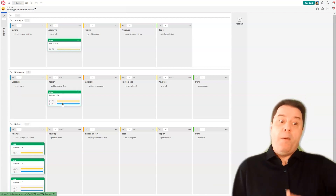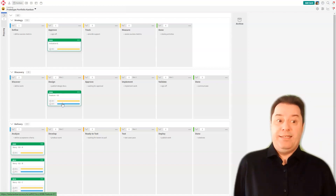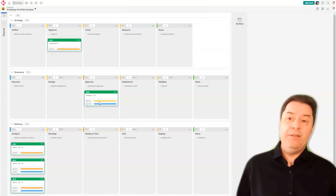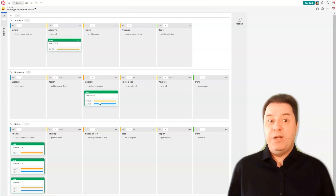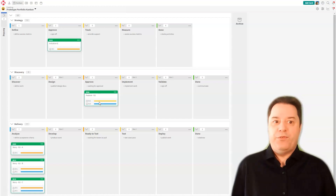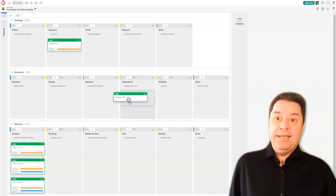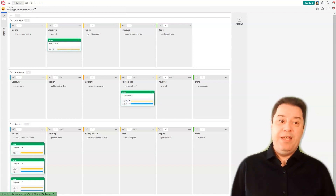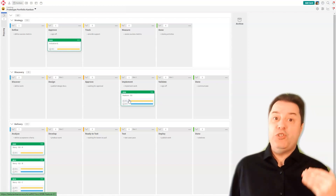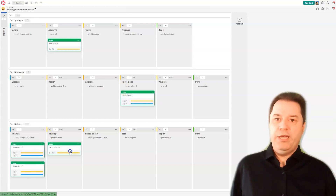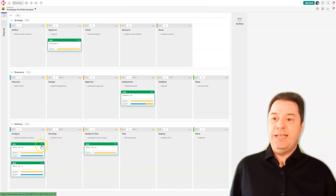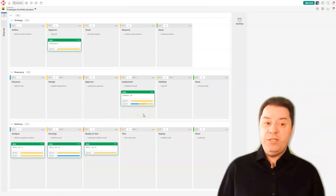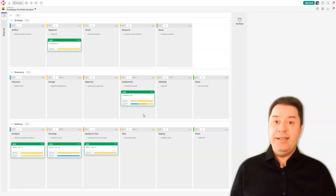It now sends a signal above and below that something is happening with this discovery card. Once it gets into the approval process, it moves into a waiting mode where everyone is informed that the card is in orange, waiting for someone to do something. Let's say it gets approved — it is now back into in progress. At this point, the delivery team has the green light to start doing their work, so they're going to start moving the card into develop and other states. The colors change to give you an immediate sense of what's going on with all these connected pieces of work.